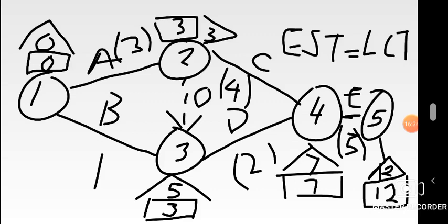They are equal. Last but not the least is node 5. So our route to go from 1, you'll be drawing my dotted lines. You've watched what I'm doing. That dotted line, okay? Then there's another dotted line passing from 2 to 4. And last but not the least, there should be another dotted line from 4 to 5. That is your critical path. Basically, that's what you do.